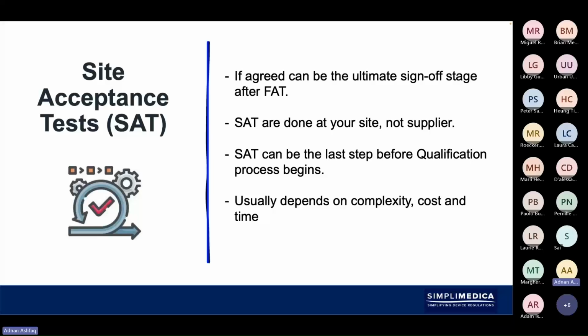But one of the things to also bear in mind, for anyone here that's in a management situation, is that you've also got to think about budgets. When you've got a contract with a supplier supplying you a piece of equipment or the clean room or whatever it is, in the contract you would put down staged payments. The staged payments would also be linked with satisfactory acceptance at the different stages.